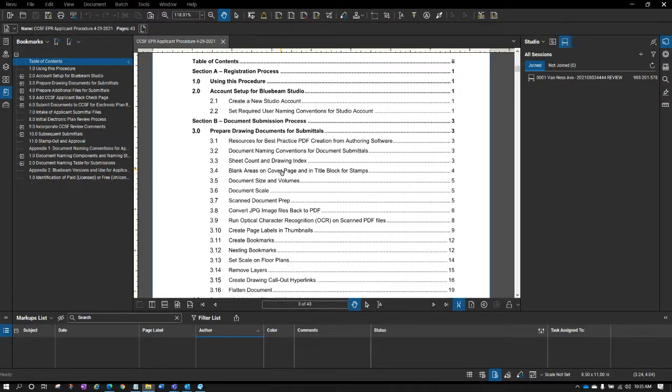Number 2, submit the documents on their own. And what I mean by that is, if you're submitting a PDF, that's one PDF that you submit for a drawing set. If you're submitting specs, calcs, other items, one PDF for the specs, one PDF for the calcs, one PDF for any other supporting drawings. It's important that you don't just bundle everything together into one gigantic PDF and send it off in hopes that we'll be able to figure everything out here. We want to make sure that you understand that when you're submitting, it's one PDF per document type, okay?